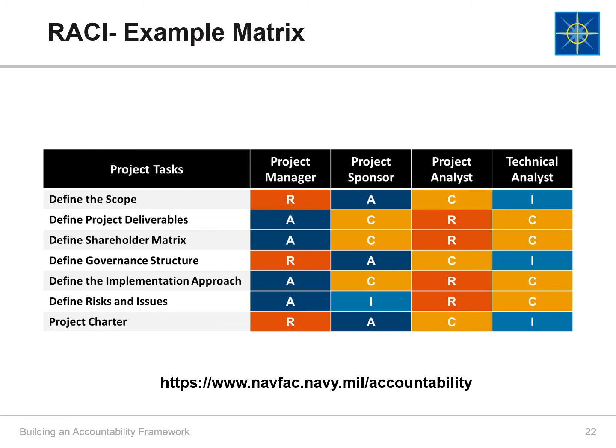Once you've completed the RACI matrix, make sure you share it with your team. Get their input to make sure all your assumptions were correct, and make adjustments as necessary. You also should share this with any stakeholders and incorporate any input they have. Just making this RACI will help move the project forward, but it's not something you should just set and forget. Use it. Refer back to it often and make sure everyone is staying on track. Treat it as a living document and update it on an ongoing basis as circumstances change.